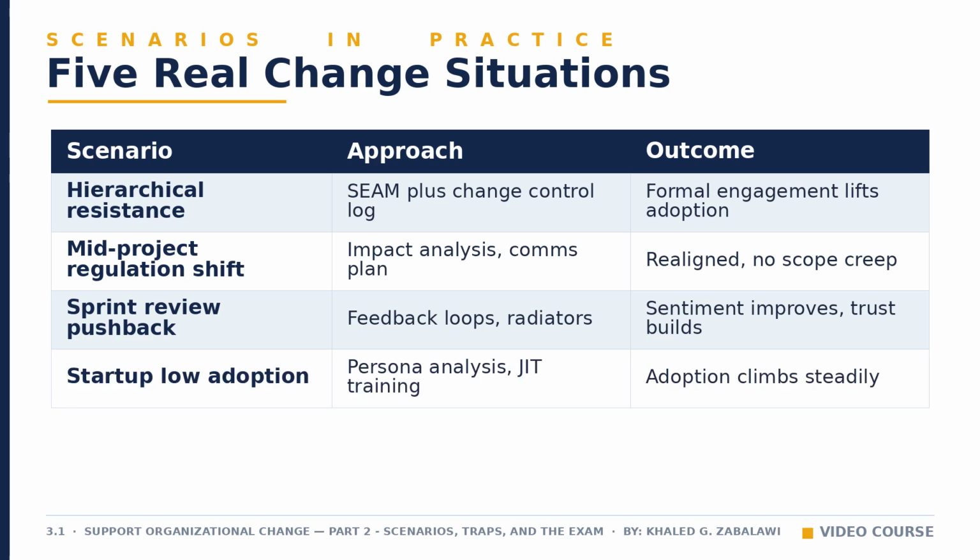A startup's new AI feature sees low adoption from uncertainty about its value. The manager uses persona analysis, delivers short just-in-time training aligned to each release, and captures real-time feedback. Adoption climbs as help arrives exactly when needed.